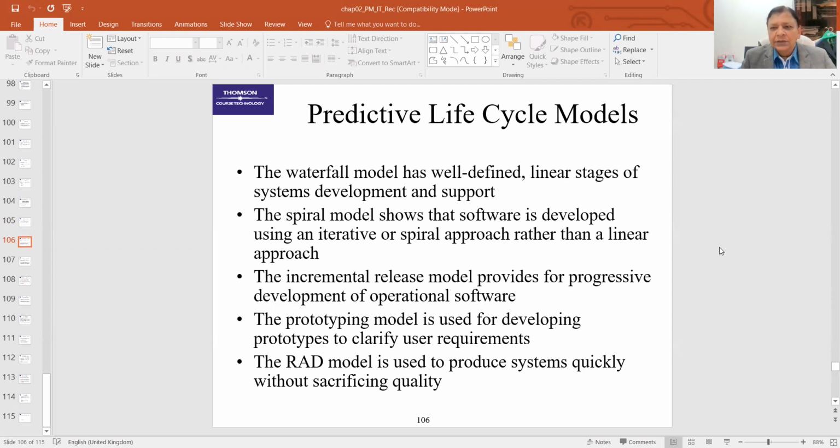So we are doing analysis and we are doing planning at the first phase of RAD methodology, the rapid application development methodology. Then the modeling. The logical design and physical design phases are merged into one phase called modeling. So 5 phases are covered in 2 phases of RAD methodology. That is the reason it's called rapid application methodology. And then you have implementation or construction and the cutover, including the deployment and the maintenance activities, training, security.